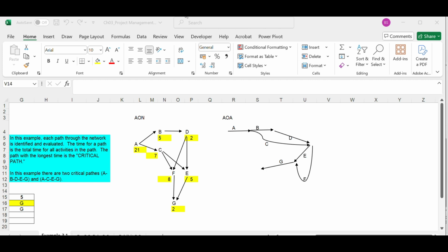In the critical chain, we include the resource dependencies of each activity. The resource dependency is in our control. It can be managed but not at the cost of logical dependency. There are two types of time estimates: deterministic estimate of time and probabilistic estimate of time. The deterministic estimate of time is a one-measure estimate. We can easily observe the activity and track the duration that an activity takes. That will be a deterministic estimate of time.